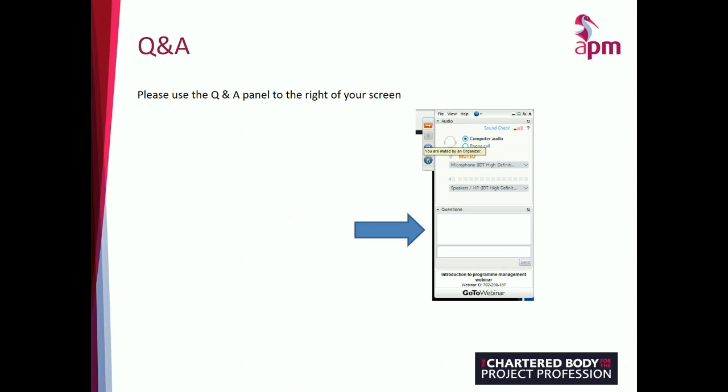Okay, thank you. In a similar vein, Anthony Cloak has asked whether you would group benefits into intermediate and final. Okay, yes. There is some additional terminology which you've just started to allude to there. So intermediate benefits is the generic phrase that would be used for those leading benefits, those earlier benefits, which would ultimately contribute towards end benefits. That's the other terminology, the end benefits, which are the ones which will be directly contributing to the objective. So that's certainly those kinds of classifications. Yes, I've seen them and I've used them, and if that's appropriate, then absolutely I would group them and order them as such. Okay, thank you.